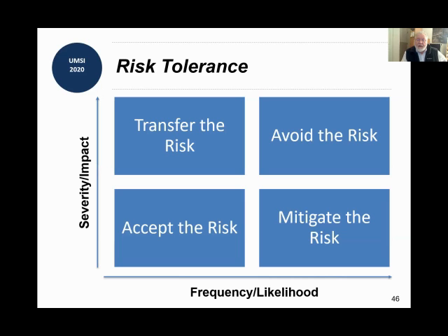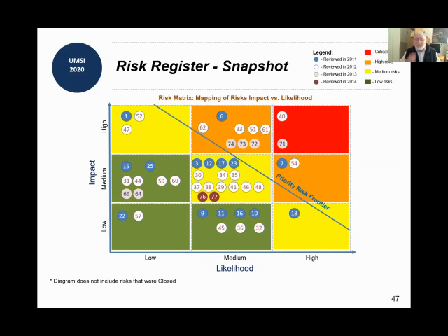And when we had to write our management letter back in response to the audit, we would indicate the items that we were accepting as reasonable risks. Now, this chart was one that we developed in the IT department, and we presented this to the audit committee of the board of directors. They loved this chart. What this showed was likelihood versus impact, just like on the previous slide. We used 3 levels here of low, medium, and high. We used a bunch of color coding. And so each of the risks we had numbered on our risk register were mapped onto this.